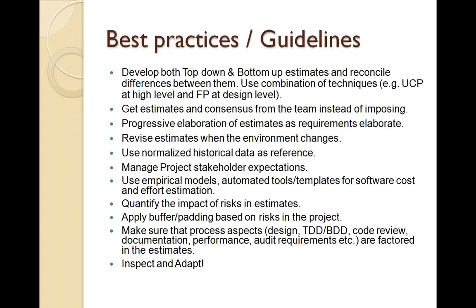One more aspect is we also need to make sure that the process aspect is considered, which means the design time, the test-driven development or behavior-driven development time, the code reviews, documentation, performance work, your project audit requirements, all of them are factored in the estimates. You're not just covering your code time or your core implementation time, but you're considering all the other aspects as well. And another key important guideline is inspect and adapt.